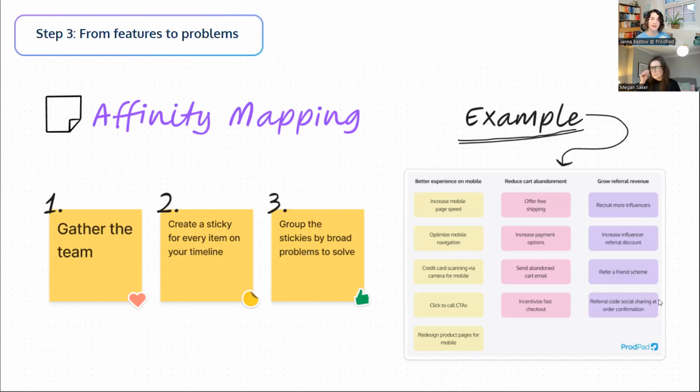If you're a very small company, you probably don't want more than 5 to 8 people in a group like this. Otherwise, it gets unwieldy. So try to find people who can represent different areas. Once you start breaking that 10-person group size, it becomes more of a lecture than a collaborative session. So try to keep it small enough that you can all pitch in and have conversations without running over each other. Keep in mind that what you're creating here isn't a final version. You're not going to just take these stickies, these groups, and publish it as your roadmap. We've got a few more steps yet, so I'll talk you through that.